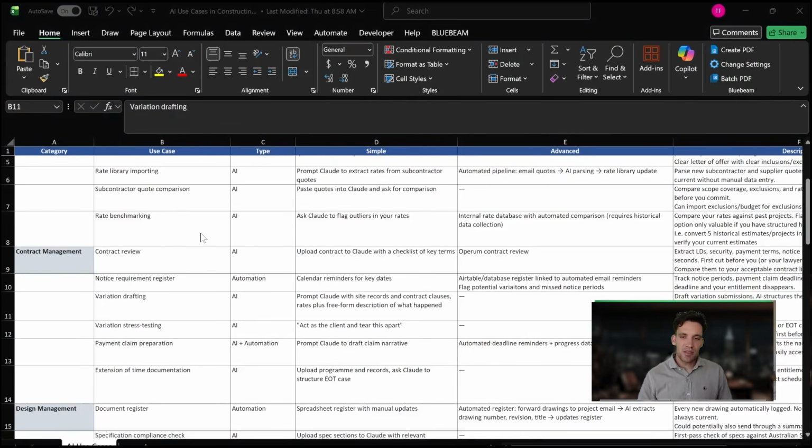Next, when we talk about contracts management, I think AI has some really good applications here for two primary reasons. Number one is a lot of contract reviews and negotiation are just a big comparison exercise where we're taking standard clauses we accept or we would be happy to sign a contract with, and we're comparing them to what's in a client's contract. We're not really relying on reasoning. It's just a big pattern matching exercise.